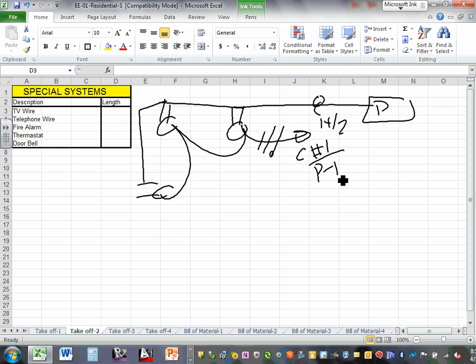If you have a wall, you must move through the wall. That's a rule. From here, going all the way through this area, I'll move right through the wall. Not in this building, but in a commercial residential building, all through the wall. Now what happens if I want to go from this area to this area? Can I go through the walls? Of course not. So what do you do? Go up, over, and down. Every time you go up, over, and down.